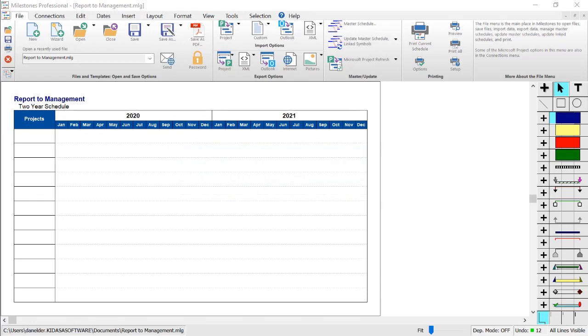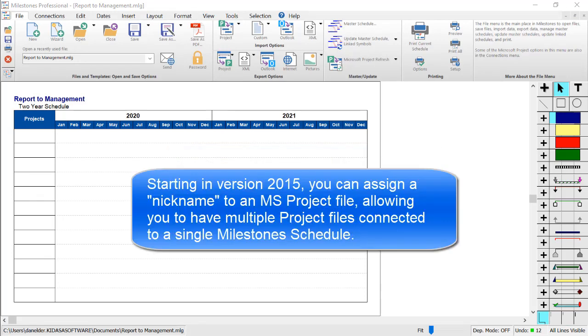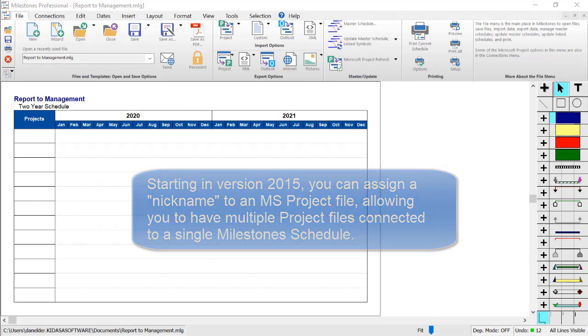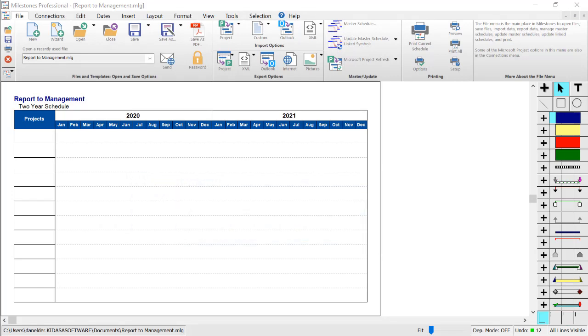We added nickname functionality starting in version 2015 which allows you to connect a single Milestones file to multiple MS project files. As an example, I will be adding a few tasks from one MS project file and then a few tasks from another project file.